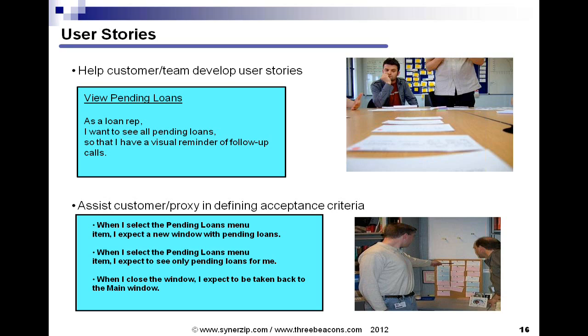And doing these acceptance criteria up front like this is a form of test first. That's what Kent Beck used to call his test-driven development approach inside extreme programming. He called it test first. So injecting this level of test first from a quality perspective, you definitely want your QA folks involved in the writing of the user stories.